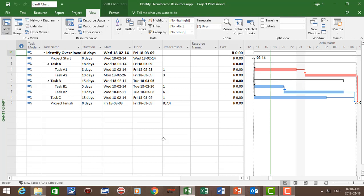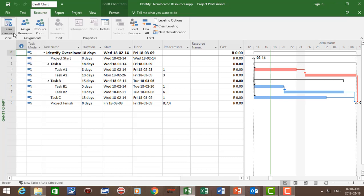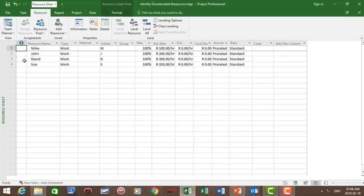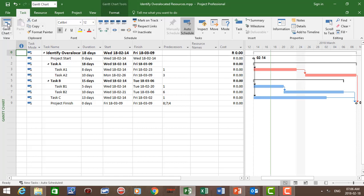I have prepared a project schedule with five tasks: task A1, task A2, task B1, task B2, and task C, with their dependencies. I've also prepared a resource sheet. Let's go to resources. On view, let's click on resource sheet. I've prepared a resource sheet with four resources: Mike, John, David, and Sue, with their respective standard rates. Mike has a standard rate of 100 South African Rand, John 200, David 300, and Sue 350 South African Rand.